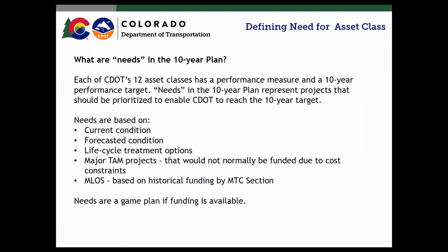Now, when we look at asset management, this is just a rough modeling of the things that we consider in terms of, well, what do we need? And so naturally the STIP, the requirement from the feds is that you do 4 years, and that becomes your program of projects. What we did here last year is we were really looking at how do we model further than that? How do we get to a 10-year plan that could then morph into a 4-year program of projects?